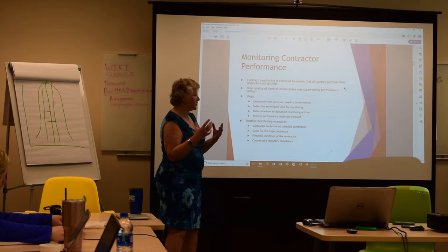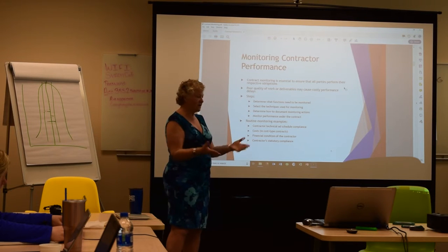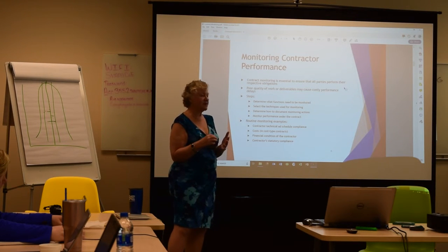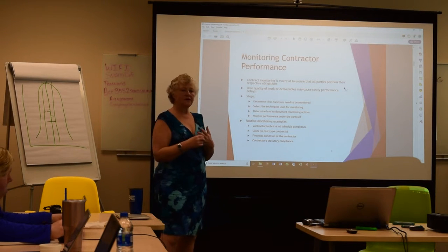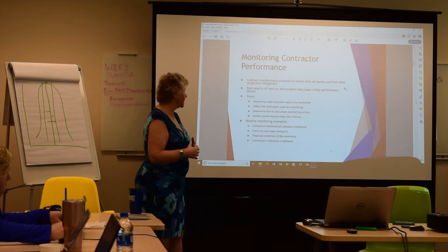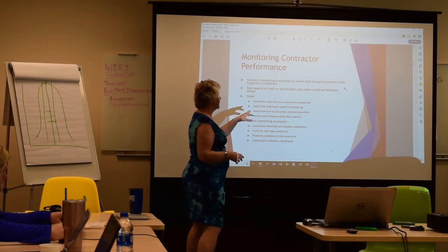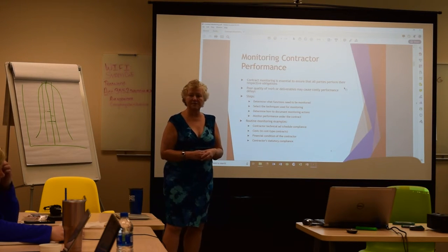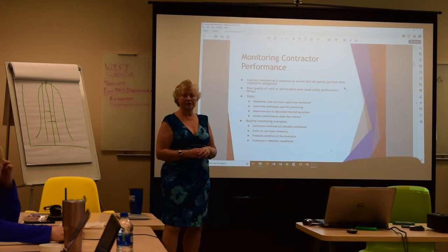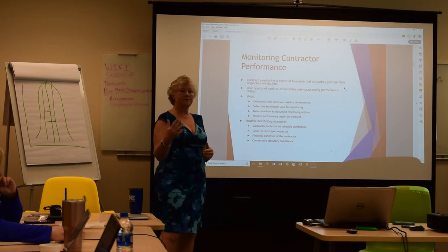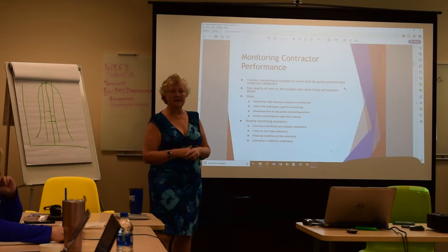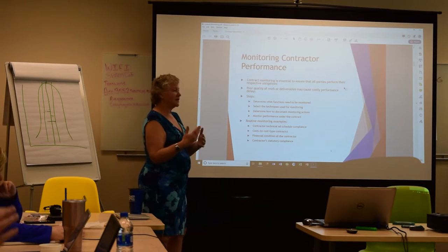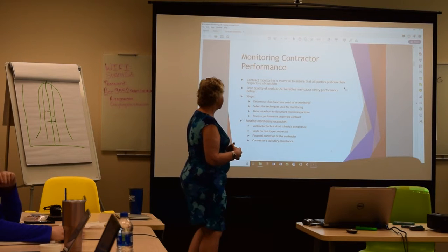So what the Corps has to do is look at, across the contract, what specific functions need to be monitored. So obviously things like deliverables need to be monitored. Maybe ongoing daily performance on a certain task, or maybe a critical task. So they decide what functions have to be monitored, and then they select the techniques for monitoring. How is it that they're going to come in and look at what you're doing? Obviously, somebody looking over your shoulder isn't going to increase your productivity. But maybe they need to do interim checks with you to see how many transactions you processed today. And maybe you just fill out a report and you just submit it as you leave. And then that way they can do a monitoring just on transactions.